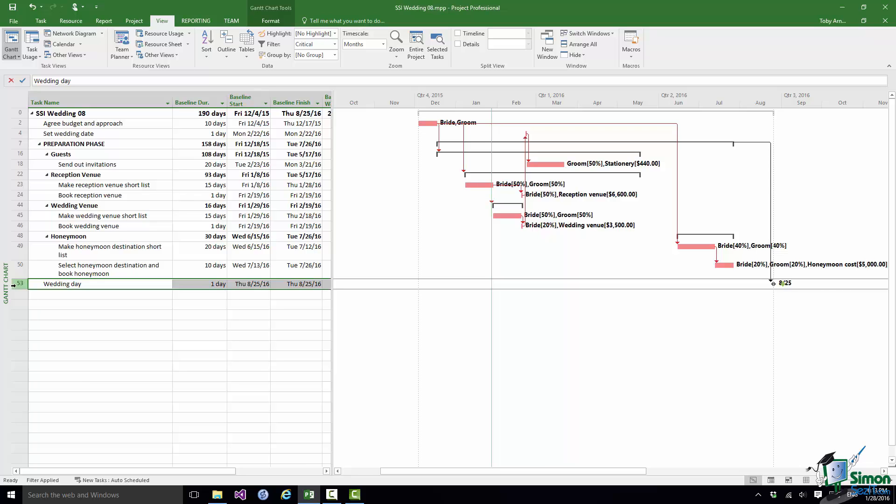The gap in the middle is largely down to the effects of resource leveling. What can happen sometimes is that although no one particular task has to be completed by a particular day you have a lot of work to do. You can probably be reasonably flexible in the order in which you complete the tasks subject to dependencies, constraints, etcetera. But basically you just have a lot of work to do in the time and resource leveling will sometimes cause gaps.